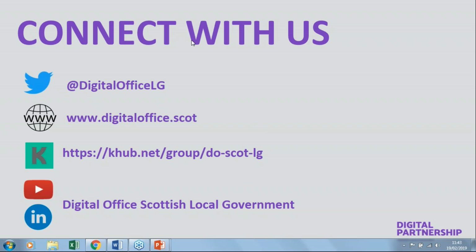But other organizations that interact with you don't have that level of involvement. So whilst you might want to be moving forward at a pace and getting applications put on your infrastructure, and you're doing all your governance and you've got things set out as a roadmap, other organizations say, okay, you can have that application on your infrastructure, but really it's going to take 6 months for us to do it. So I would say the biggest frustration is trying to coordinate everyone to deliver in the timescales that you need to.